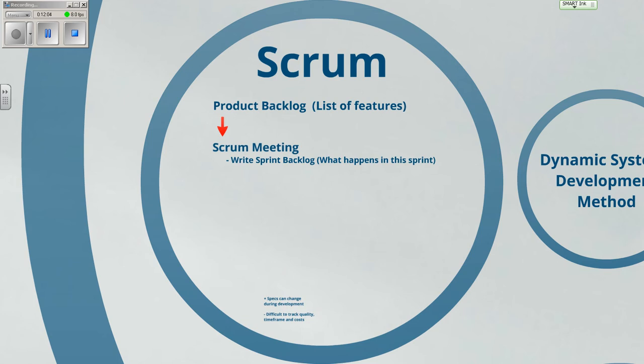And before you do a sprint, you start out with a meeting and you agree the purpose of your sprint. Does this make sense? So if you've got a 6-month project, you might agree to have 6 sprints within that. Each sprint has a different purpose. So your first sprint might well be to find out what the requirements are. The second sprint might be to code up those requirements. And the third sprint might be to check whether those requirements were actually what was required or not.